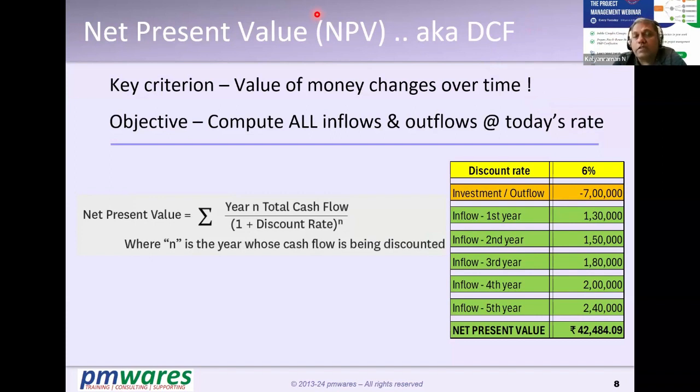Now I'm going to flip this scenario. If you are delivering a project, now you are going to project this scenario over the next few years. Would you therefore factor the revenue coming in from that project as constant? Let us say you would be factoring in your contract, I will earn 10 lakhs per month over the next 3 years. Every month I am going to do a billing. Does that translate to the same purchasing power of 10 lakhs as what you have today versus 10 lakhs 3 years down the line?